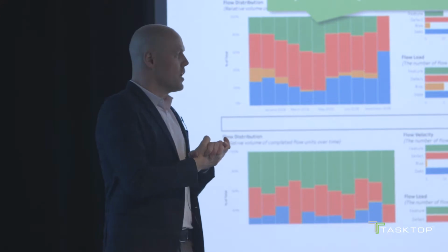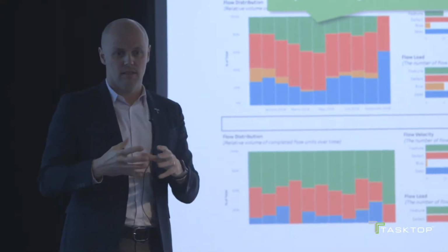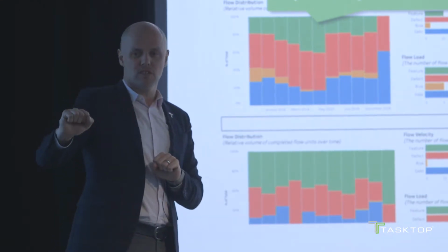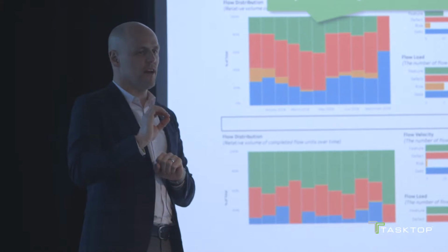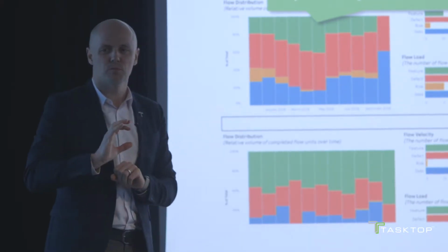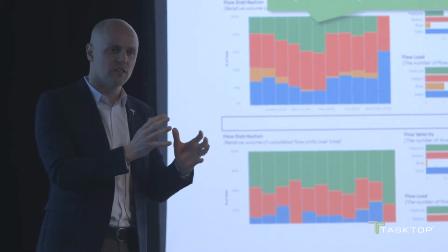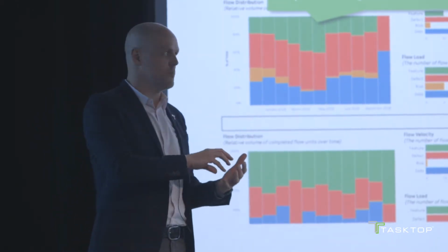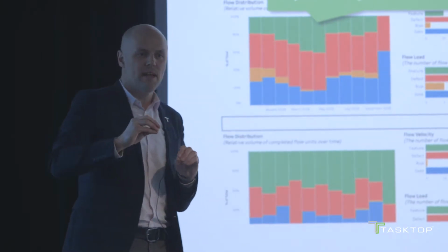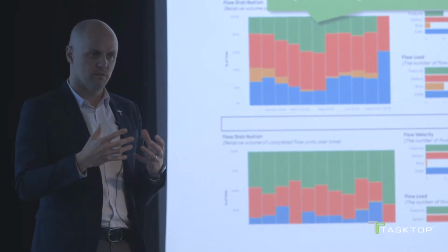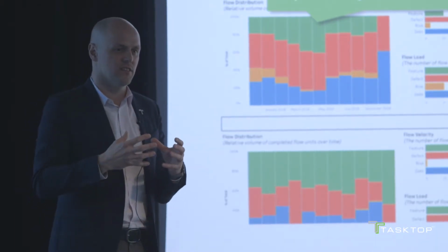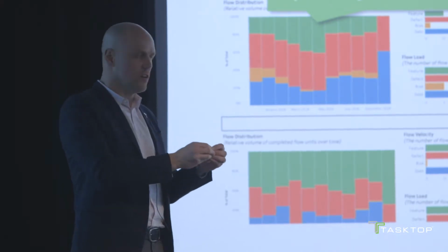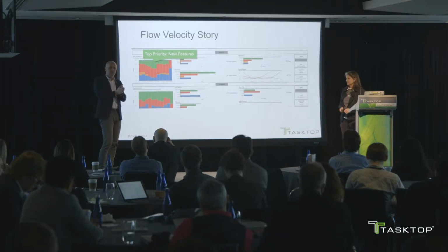The thing that was much less obvious, and this is where one of Dominica's time thieves, dependencies, comes in, which I think she'll talk about in a moment, is that the kinds of features the team was implementing were features that spanned value streams. And those dependencies can be super tricky, especially if you don't have exactly the right kind of architecture and APIs. So you can actually see that flow load bar, how many features the team is working on concurrently, go up and up and up. And as flow load increases, because it's a measure of WIP, work in progress, velocity decreases. So we just kept making things worse and worse because we hadn't solved that root problem, which is the dependencies between the value streams.